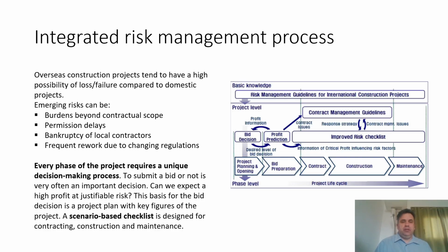Overseas construction projects tend to have a higher possibility of loss or failure compared to domestic projects. Emerging risks can be burdens beyond the contractual scope, permission delays, bankruptcy of local contractors, frequent rework due to changing regulations.